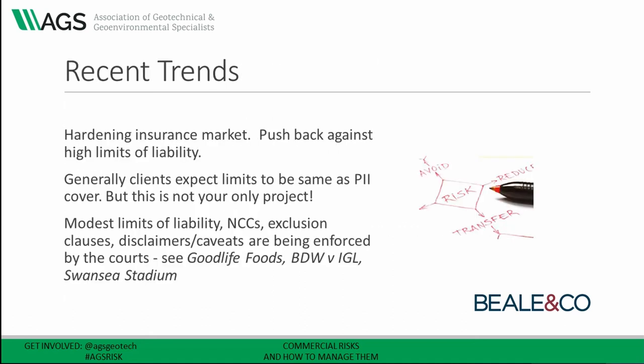Just to end on a note about recent trends. As you're probably all aware, the insurance market is hardening, which means it is even more important that you stand your ground in negotiations with clients and third parties. Generally, clients expect your limits of liability to be the same as your PI cover, but that is simply not appropriate — this will not be your only project, you might have a claim on another project which erodes that limit, and it may simply be disproportionate to the size of the fee you're receiving. A good way of arriving at an appropriate financial cap would be to have a multiple of your fee, be it 10 times or 20 times — and that's likely to be a lot less than the limit of your professional indemnity insurance.